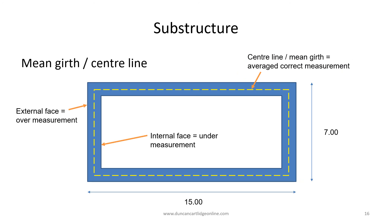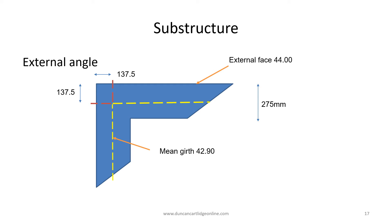NRM2 states that masonry should be measured on the centerline or mean girth. Looking at this drawing if we use the girth on the external face we are over measuring and if we use the girth on the internal face we are under measuring. It's necessary therefore to calculate the centerline as shown on this page in dotted yellow. The mean girth can be calculated from the external or internal dimensions and is based on the number of external angles. When working from the external face deduct twice times, half times the thickness of the wall for each external angle. When working from the inside face add twice times, half times the thickness for each external angle.